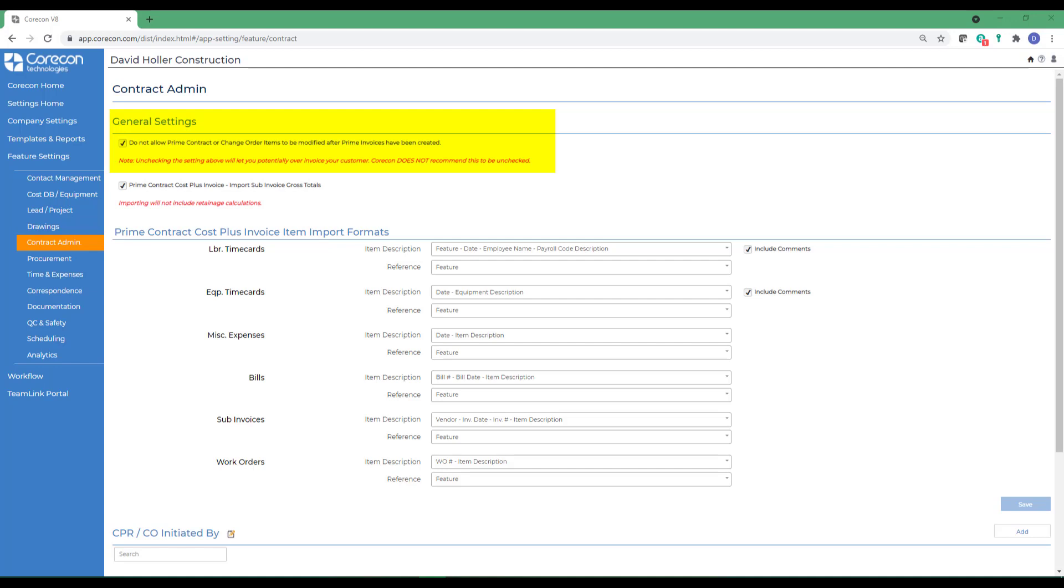If this remains unchecked, any user will be able to make changes to the prime contract and change orders, as well as potentially you could over invoice your customer on a prime invoice.